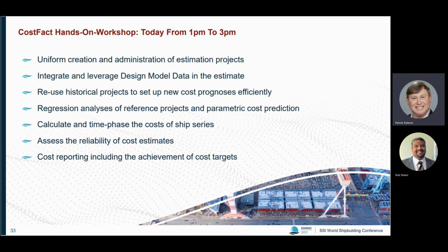One of the common threads we found in each of the shipyards was how they approached pricing a change. At that time, everybody pretty much was doing it the same way. They were passing a spreadsheet around, a form, and everybody filled in their information. Each department added their number based on certain information.